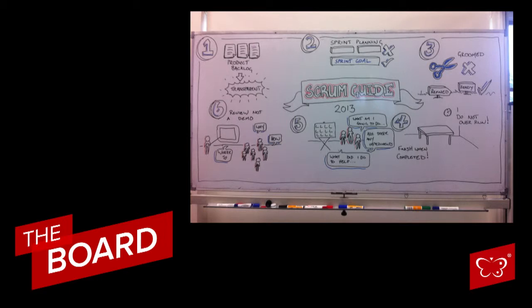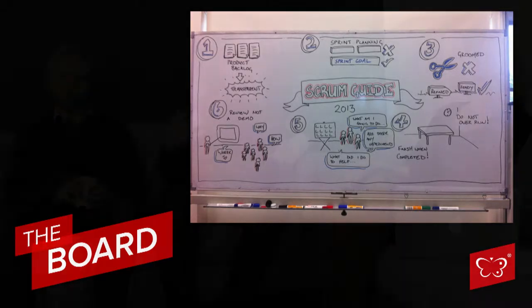They said that for a month-long sprint, your planning sessions should be 8 hours. For a 2-week sprint, should be 4 hours. But they're a little bit vague about that. So what they're saying now is that your sprint planning, if it's a month-long sprint, should be a maximum of 8 hours. But really, it takes as long as you need. So this is common sense, though, isn't it?